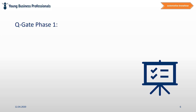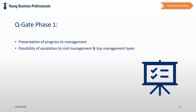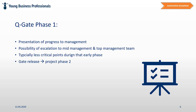Quality gate Phase 1. Once all these activities are done, the project manager has the pleasure to present the progress of the process phase to the management and top management of the company, who may then decide based on the project manager's recommendation to release APQP Phase 1 and open the gate to Phase 2. The project manager presents which activities have been performed and whether they have been closed in time. In case there are still actions unfulfilled, this is the right time for the manager to escalate to management and ask for special attention and support.